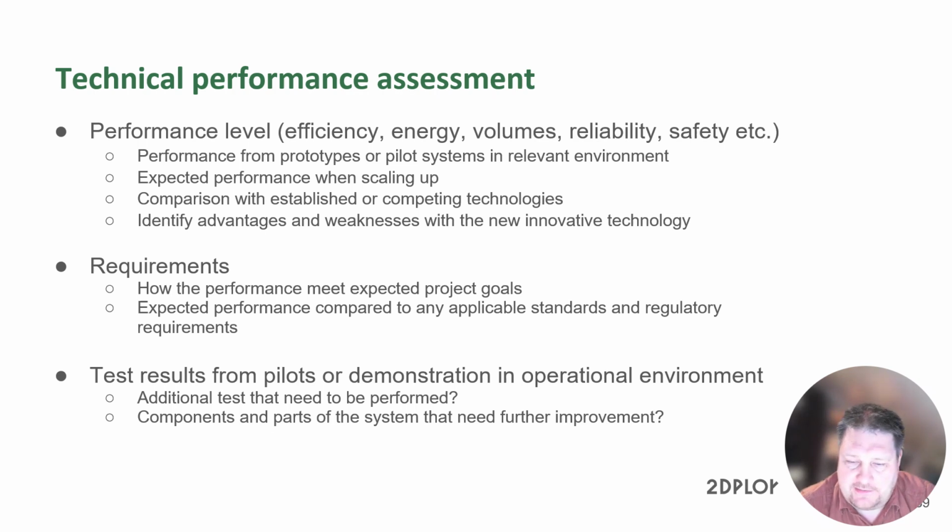You will face challenges during your project. We often refer to them as some child disease. The first year or two in production, you might see a lot of minor problems, and you need to solve them one by one.